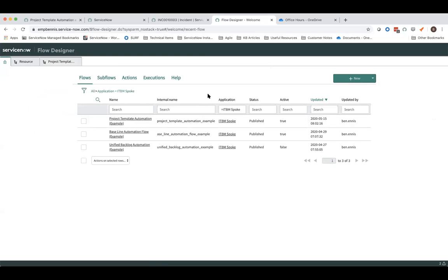Yeah, this is a great little rule that the PMO could have. You could say, okay, every project manager, if you don't close the project within, say, 6 months of the end date, then it's going to automatically close unless you do something. If there's activity on the project, then it wouldn't. So you could do something like that with a flow. Yeah, absolutely. It would also close all the resource plans. So that's really the more important piece.